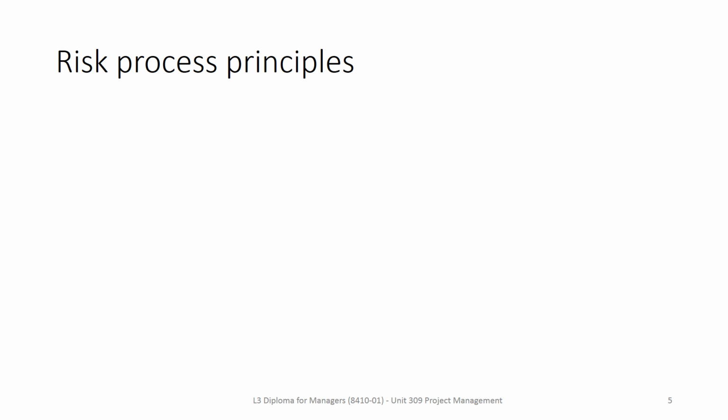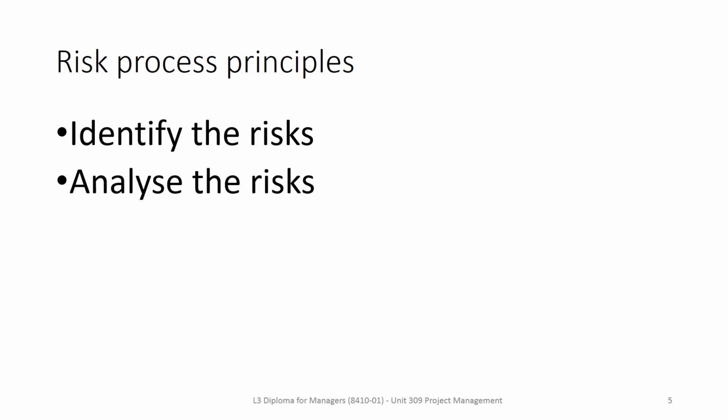First of all, and absolutely critical, is that we identify the risks. So we need to identify the potential risks to the project or to the outcomes. We then need to analyse each of those risks and their likely impact on the project, and we can use the red, amber, green to prioritise these, because prioritising them and ranking them according to the likelihood they will have and how much damage they will cause is essential.